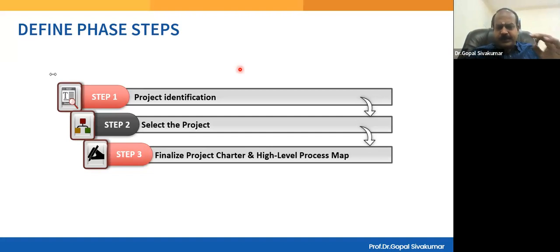These elements will clearly speak about the Y variable, the Z variable, the departments that are going to be involved, and also the departments or the boundaries beyond which things are excluded. That is, I'm talking about the scope again, in scope, out scope. It will also give a broader idea of the process we are going to focus on. So this is called a project charter. We are going to learn it today, and you might be using it.